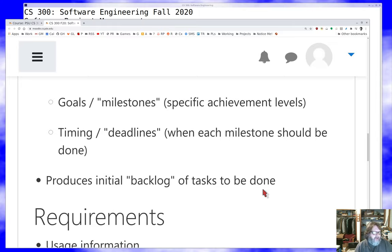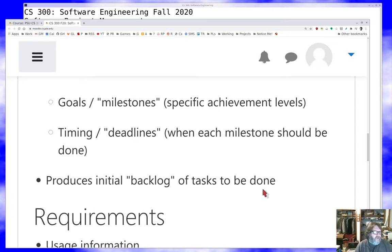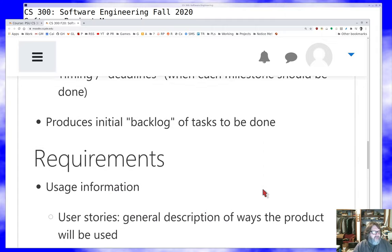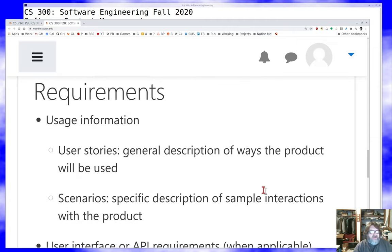One side effect of the roadmap — we haven't really talked about scrum or agile development yet — is that it produces what we call an initial backlog. It produces a bunch of things that you need to do first. At the end of that roadmap process, you may not know exactly what you'll have to do all the way along, but you have a pretty good idea of how you're going to get started, and that's one of its important roles.